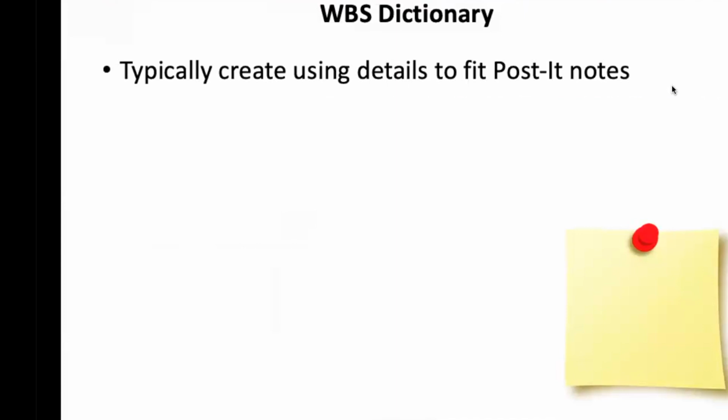And usually it's written in Excel, like you have 111, let's say buying the furniture, and then you have an explanation, who's gonna buy it, when it's gonna be bought, what's the color, whatever they need to know, right? So it really supplements the real WBS, and we call it WBS dictionary, which you look at your dictionary to understand the words more, right?